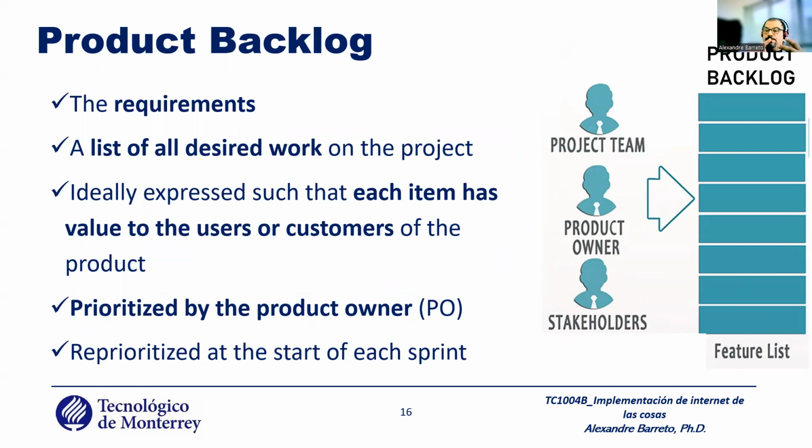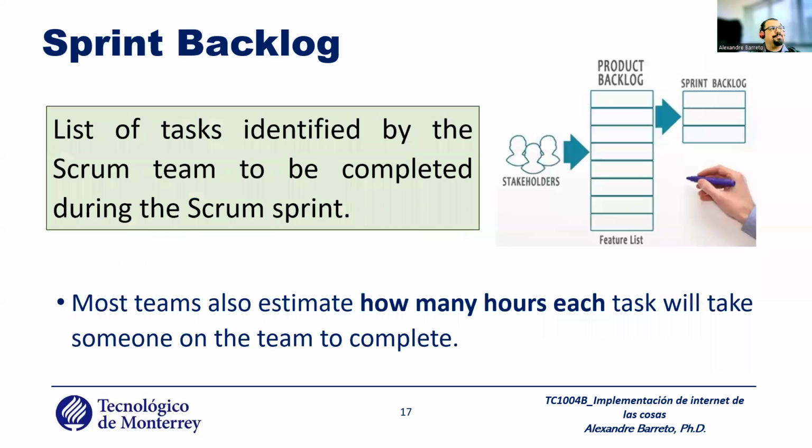Remember: who, what, and why you need to do some features. Remember too that you have, for example, non-functional requirements like security, interoperability, and others. You need to describe these things in an acceptance criteria.